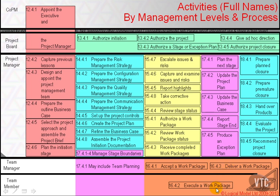If a team is sufficiently large that it has team managers, then the team manager accepts and delivers, and may well also execute. But team members are the ones who execute work packages.